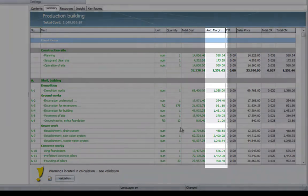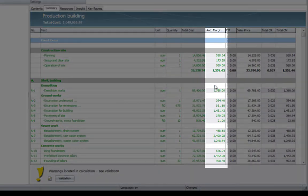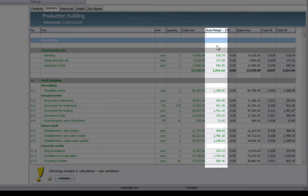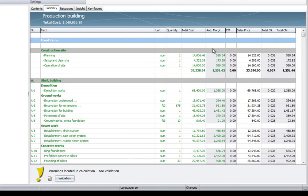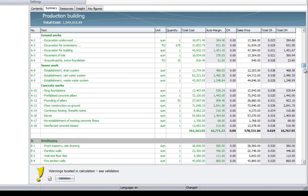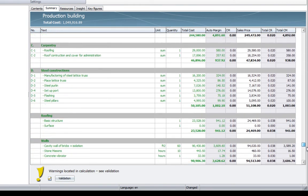Doing that, Sigma introduces a new column here called Auto Margins. Based on the input values you gave to the categories, Sigma analyzes all components and figures out what Auto Margins to add to that component.